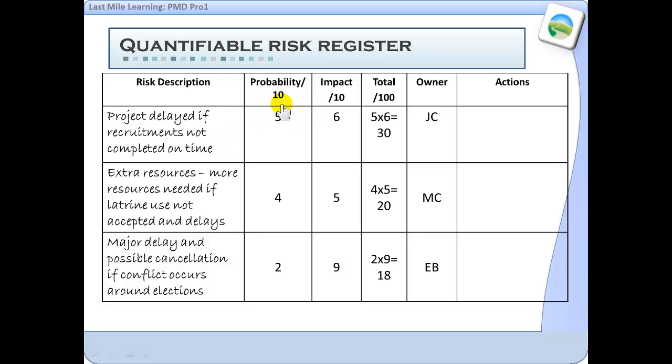And then there's a scale that's used. This happens to use a 10-point scale. You could use a 3-point or any 100-point, any kind of a scale you want. And then you give a score. In this case, 10 is the highest probability, 1 is the lowest probability of each risk. The other variable then is impact. What if these risks were to actually happen, were to come true? What would be the negative impact, with 10 being the highest negative impact and 0 being the lowest negative impact?